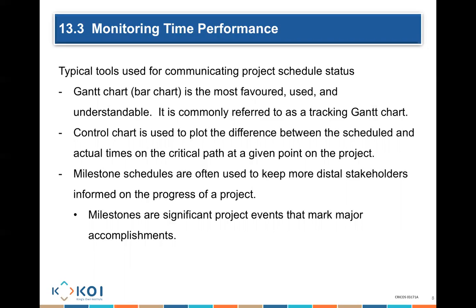And so on. There's also the control chart. The control chart is used to plot the difference between the scheduled and the actual times on the critical path at any given period. We're going to do some control charts today as part of the actual tutorial, as well as I'm going to show you some control charts as part of the actual lecture. There are also milestones.